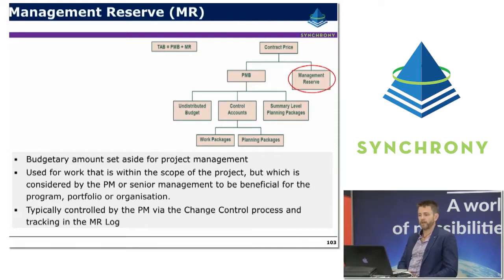Management reserve. As we mentioned earlier, it's a budgetary amount that's typically set aside for project management. It's actually different to contingency. It's used for work that's within the scope of the project, but it's considered by the PM or senior management to be beneficial for the program, portfolio or organisation. The management reserve is typically controlled by the project manager via the change control process, and it should be tracked using some form of MR tracking log.